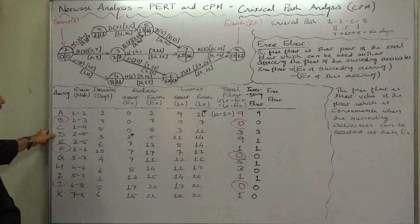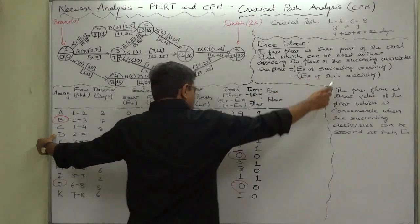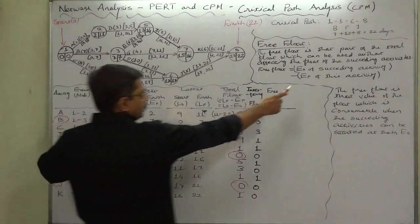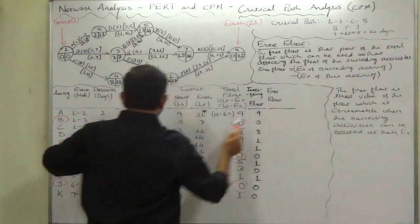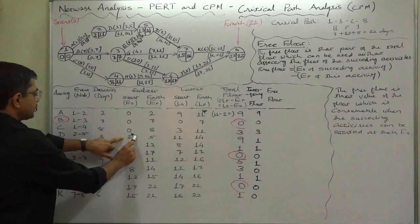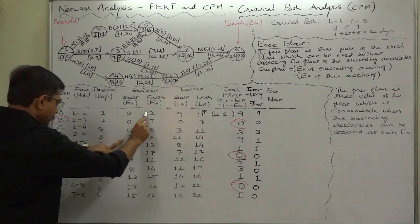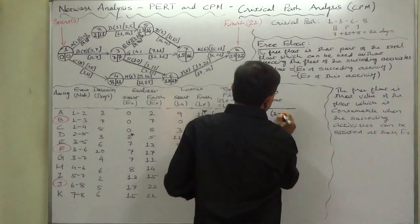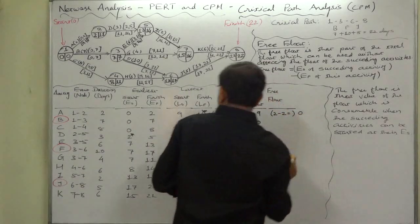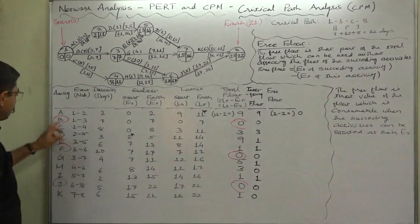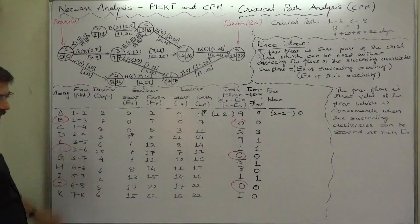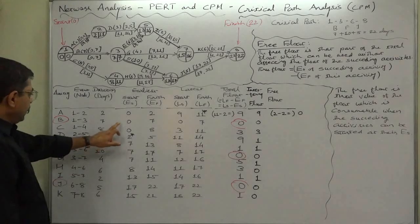Let's calculate it for activity A. Its succeeding activity is D, so earliest start time of D comes to 2 and earliest finish time of A comes to 2. So 2 minus 2 equals 0. In case of B, even if you don't write the floats for critical activities, it is always allowed.